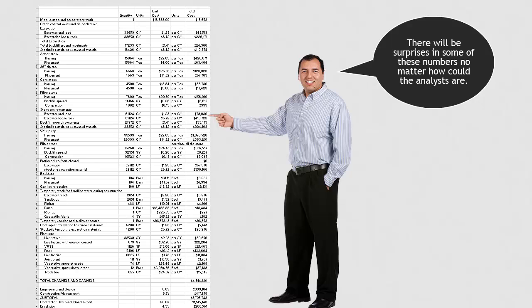We may be justified in having a high degree of confidence in our cost estimate, for example, and we may believe that any individual quantity or unit price will turn out as expected. But when we take the hundreds of components together, the probability of the cost equaling the sum of these most likely values can be vanishingly small.